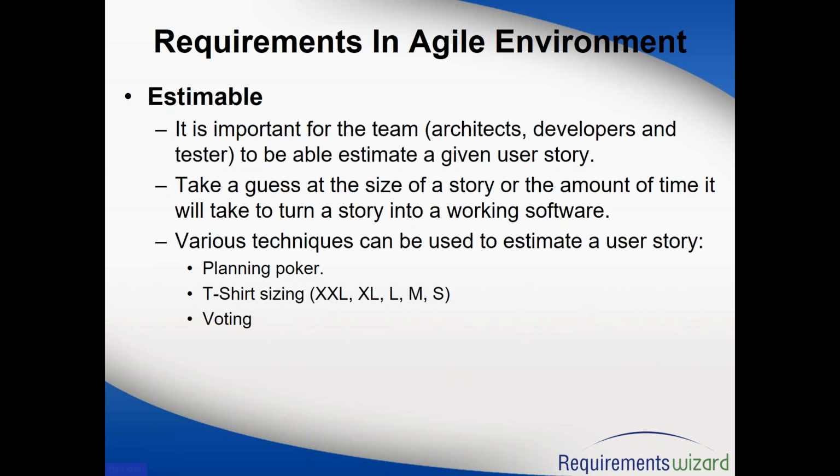So there you basically want to compare apple to apple, right? If you tell them, okay, how much effort will it take, how much time will it take, the experienced guy may say, okay, I can do it in 16 hours, whereas the new guy will say, I can do it in 40 hours, correct? But that should not be the basis of estimating. The basis of estimation should be how much work that really is, how complex that particular story is. So that's why you want to take the hours out of the calculation and say, okay, give me the size or complexity of it.